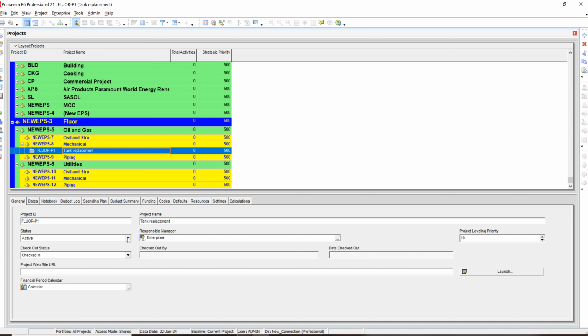whether this project is active or not. It means that it started or not started. If it started and people are working there, it's active. If it started but now they're not working, then it means inactive. Planned means we planned to start later. Okay, then you can choose whatever you want here, but normally active and inactive are the two major items that people are using. But you can use it as active, for example, now.